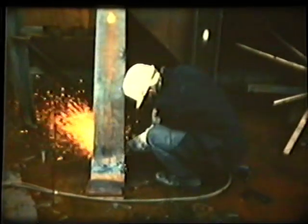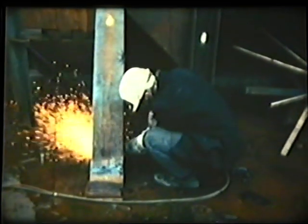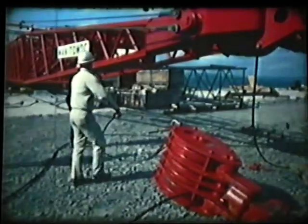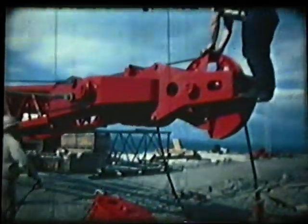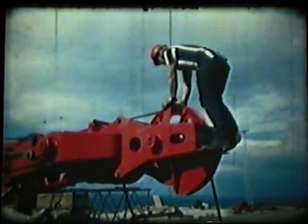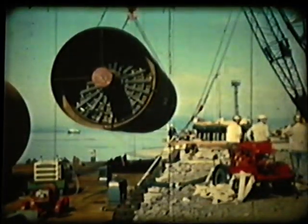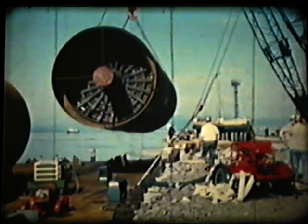Major items of equipment were brought in by sea. 14 mobile cranes were the first items to come ashore on the new unloading quay, giving freshly trained riggers their first taste of real action. Cranes had to be cut free, rolled ashore and mobilized. Progress in the training school and the yard's construction had been synchronized to meet the deadline of July 1972. For them, the crane's first job was to unload tank sections fabricated elsewhere and shipped in.